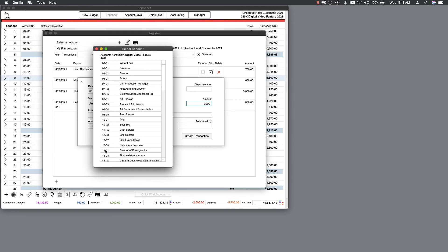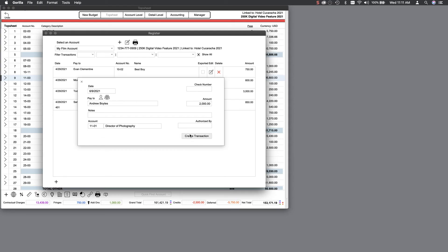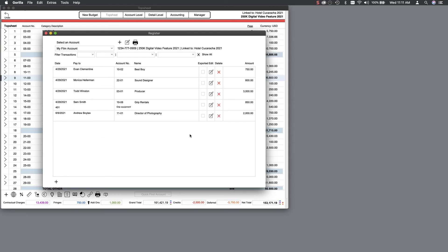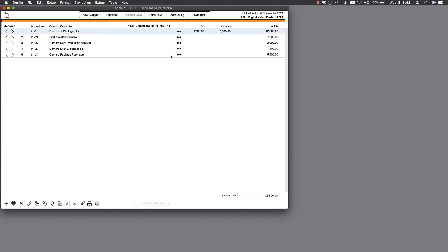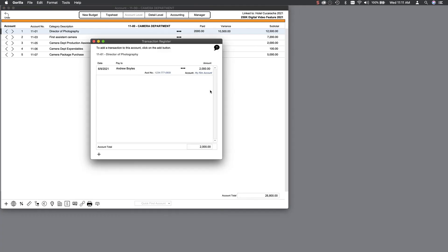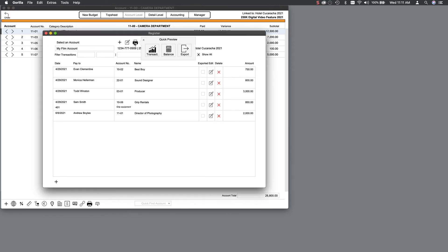Now, if we go to the 11-01 category on the account level, we will see that this line is budgeted for a total of $12,500. We've already paid the crew member $2,000. In this way, you can track all the expenses against your budget to make sure you are on track.